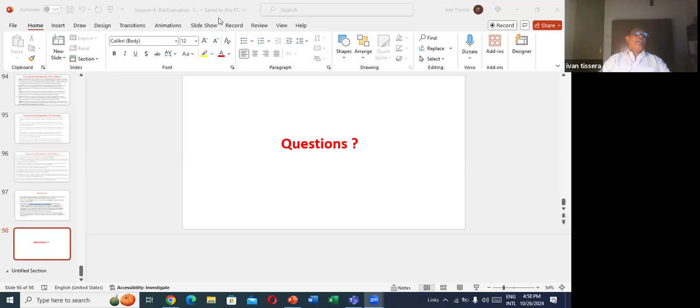That is the binding agreement. The money, the evaluated contract price, everything is given in the contract agreement. Whether it is a lump sum contract or a measure and pay contract, that is the binding document. There is no letter of award after that.